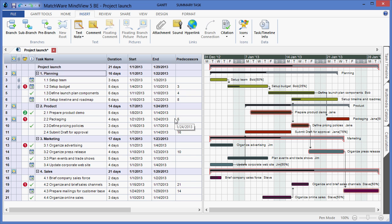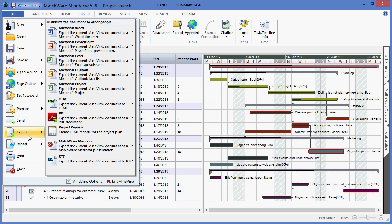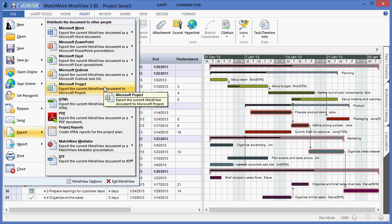All of this Gantt chart information can be further updated within the MindView interface, or if I need to export this to another program, I can simply choose File, Export, and choose the desired program. As you can see, Microsoft Project is an option.